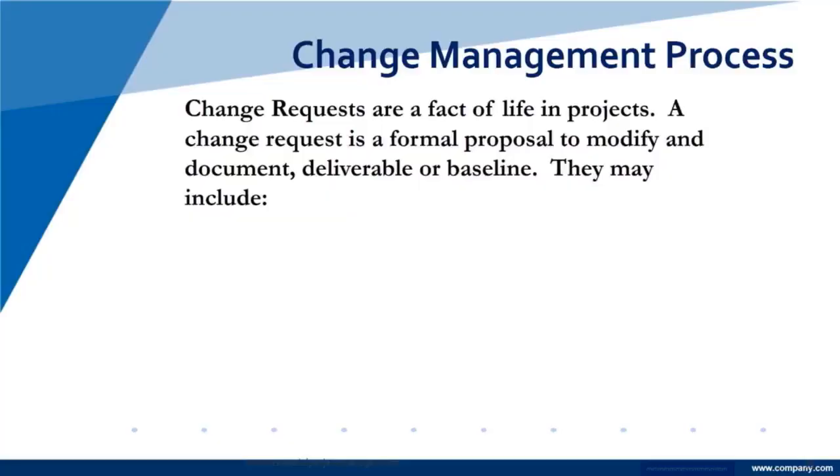Change requests need to be formal, and they need to really include corrective actions. So when you're looking at a change, the request has to be formal. It must say, what are you changing? What is the corrective action? Am I asking for more budget? Am I asking for a delay in the schedule?